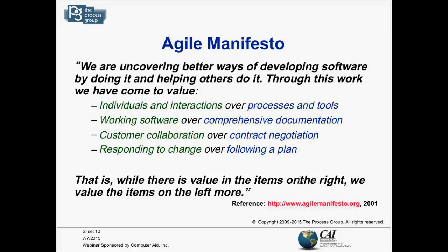However, if you focus too much on the left and ignore the right altogether, because teams may value the left more than the right, then there are negative consequences of doing that too. That's where the results of Agile become less than good, because people get into a busy state of doing work every 2 weeks and they may actually lose a complete view of the long-term part of the project.